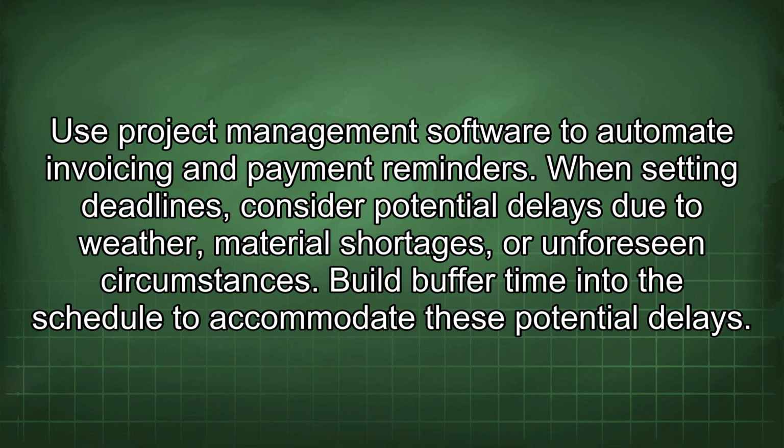When setting deadlines, consider potential delays due to weather, material shortages, or unforeseen circumstances. Build buffer time into the schedule to accommodate these potential delays.